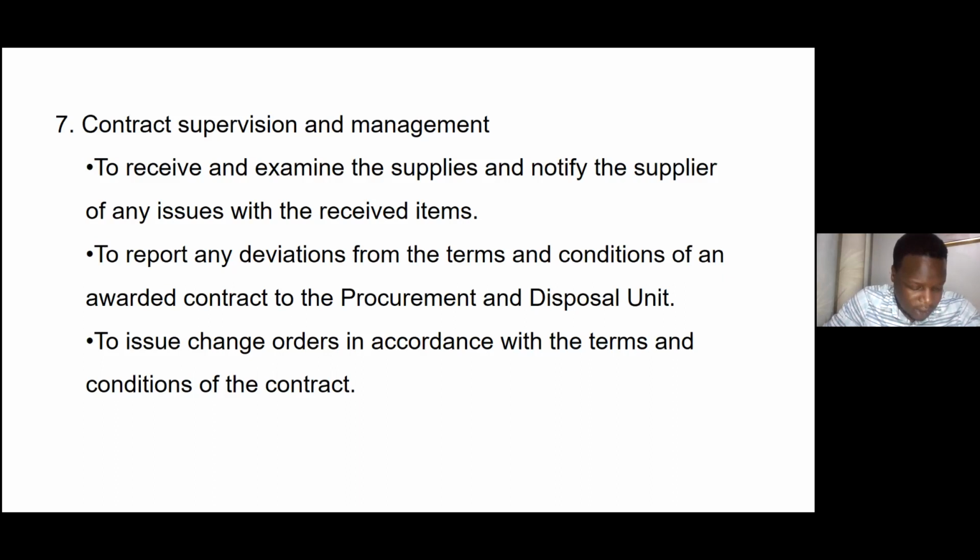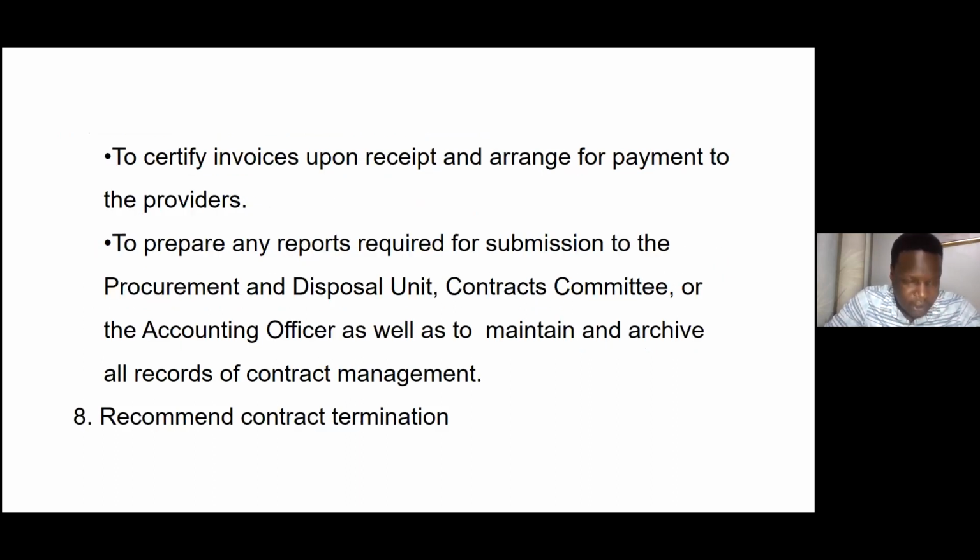They also help certify invoices upon receipt and arrange for payment to the providers. They do prepare any reports required for submission to the procurement and disposal unit, contracts committee, or the accounting office, as well as to maintain and archive all records of contract management.